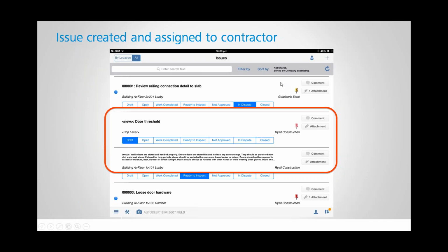So as you go through and the main contractor is looking at all the items, if they see a lot of yellow push pins in one area of the building, that's going to be their focus. They've got a lot of stuff that they've got to act on. Whereas other ones that are closed off, they can say, okay, that's fine, or okay, we've got a lot of red ones here, we've got to go out and inspect and then sign off on it, and then we can come back and we can approve it or close it off.